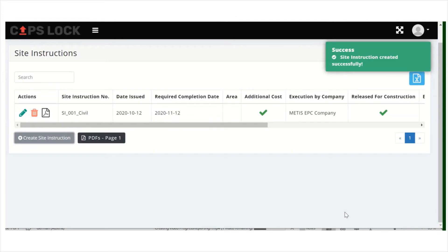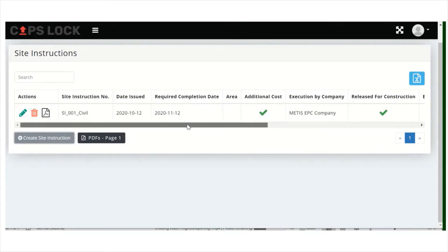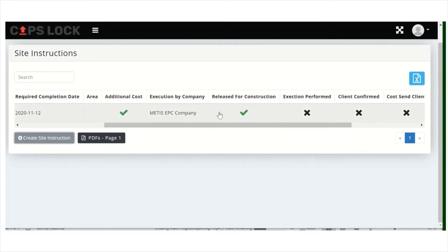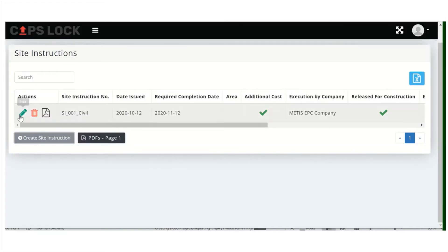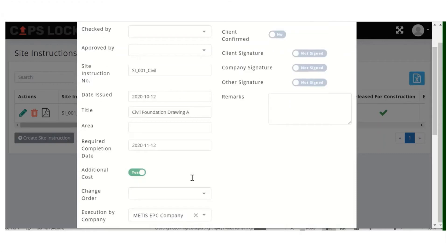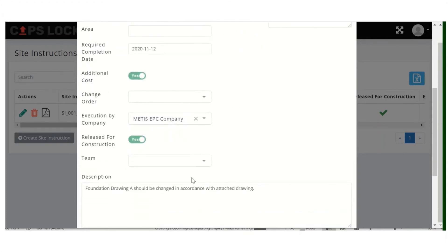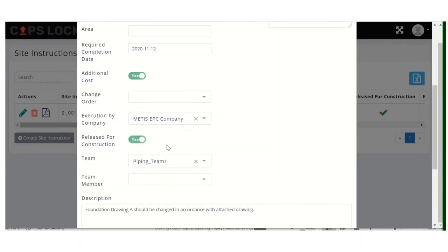The site instruction is then already visible to everybody who has access. On the dashboard you can see the additional costs, if it's released, and the status of the execution. You can also enter the related company and specify which team will do it — for example, the civil team or the piping team.